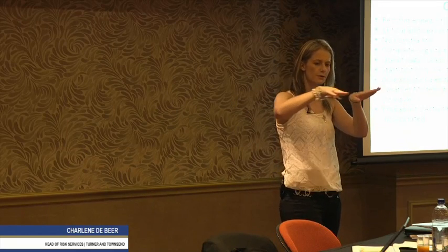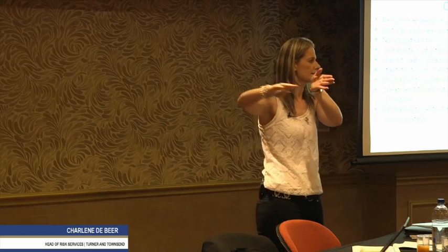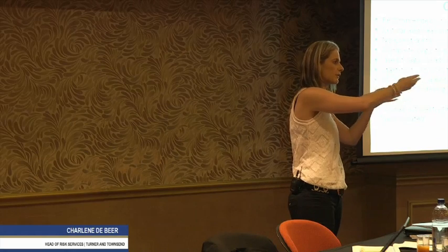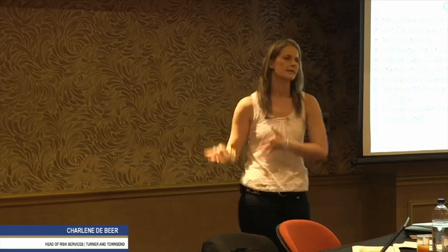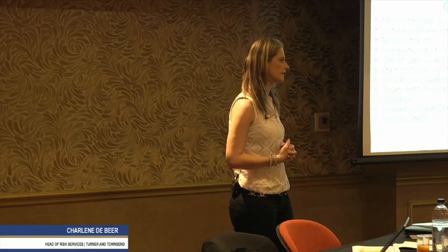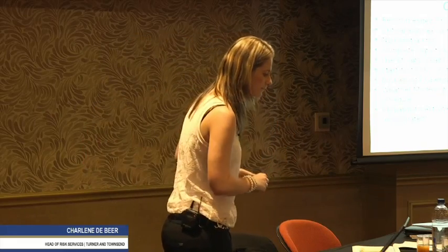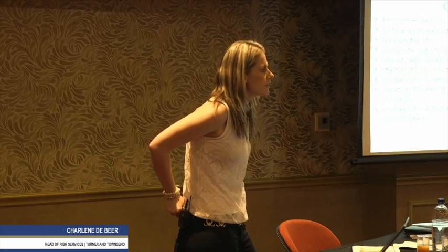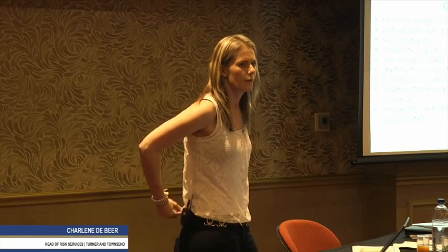It will first run the first risk's impact, and then after that it will run the second risk's impact. So it won't attach and run a risk in parallel like a schedule. It will actually double dip on it. So rather take the second risk and look at other activities in the schedule that it might affect. Because then you'll get a better idea or a more accurate schedule impact analysis. Look at critical and near critical path activities if you link them. So look at which activities will drive the critical path or which ones will pose a threat and knock onto your critical path.